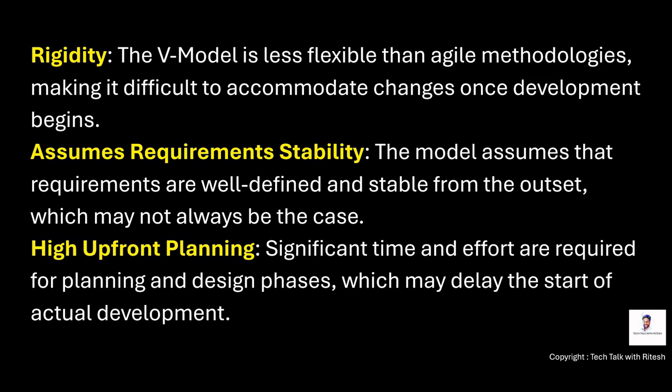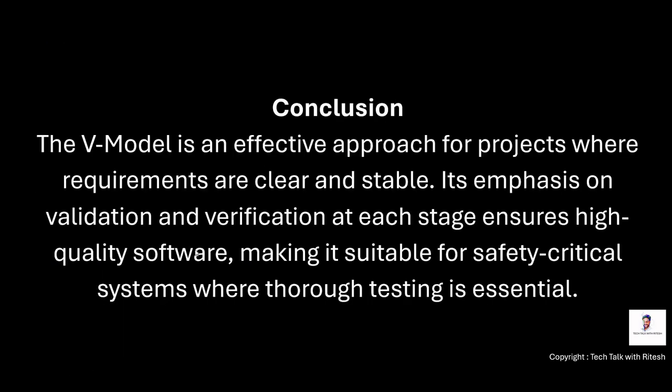Assumes requirement stability. The model assumes that requirements are well defined and stable from the outset, which may not always be the case. In 99% of cases requirements change. So it is very difficult to have static fixed requirements and then on top of that we start working. So that's why this is one of the disadvantages of this model. High upfront planning. Significant time and effort are required for planning and design phases, which may delay the start of actual development. So let's conclude this.